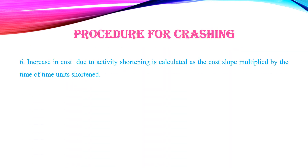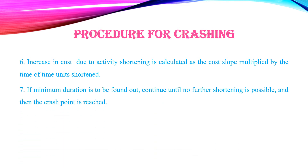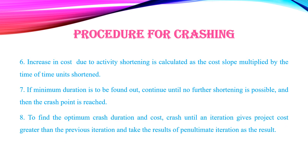Step 6 — The increase in cost due to activity shortening is calculated as cost slope multiplied by the number of time units shortened. To find the minimum duration, continue until no further shortening is possible and the crash point is reached. To find the optimum crash duration and cost, crash until an iteration gives project costs greater than the previous iteration, then take the results of the penultimate iteration.